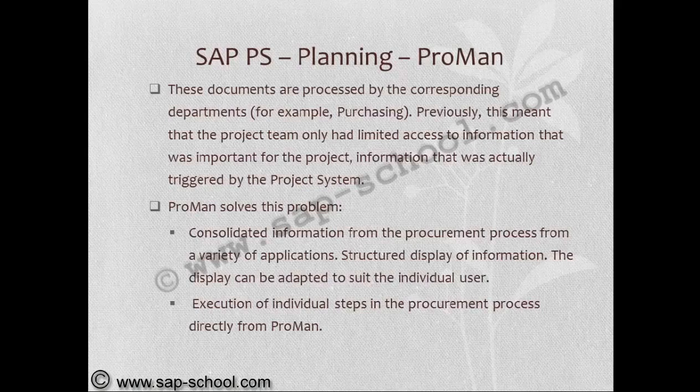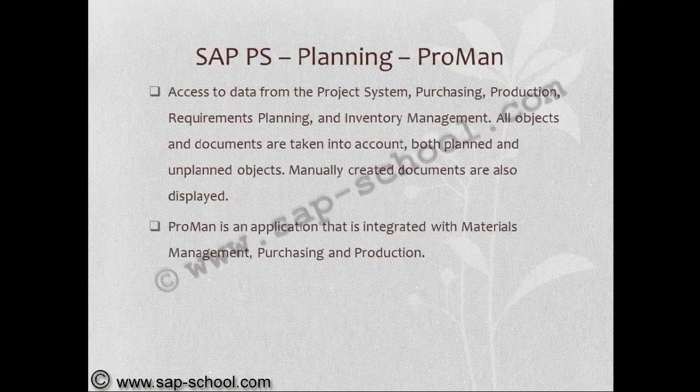Now, Proman solves problems like consolidating information from the procurement process from a variety of applications, and structured display of information. The display can be adapted to suit the individual user. It allows execution of individual steps in the procurement process directly from Proman, and access to data from project system, purchasing, production requirements planning, and inventory management. All objects and documents are taken into account. Both planned and unplanned objects, and manually created documents are also displayed.